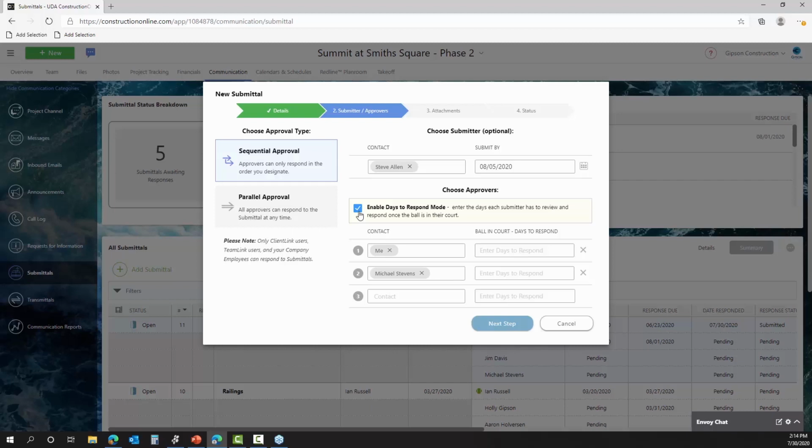Yeah, that's exactly right. Now, this approach is actually very simple. One thing you'll notice is that you have to have some type of start to the system, and that really is going to be the submission date. If you're not using a submitter, then the system kind of kicks off from the day in which you would assign in the very first piece.